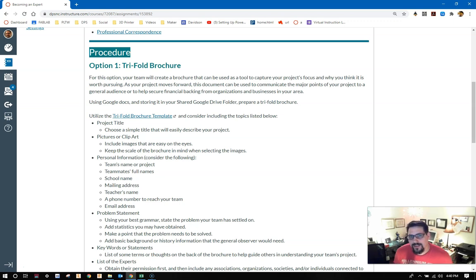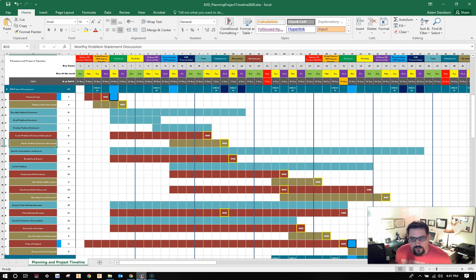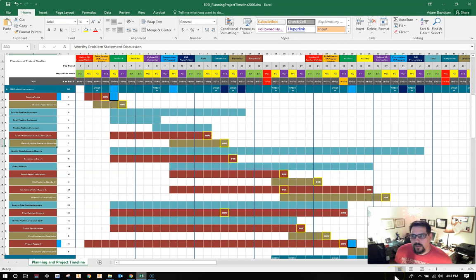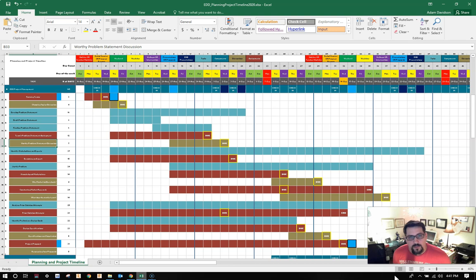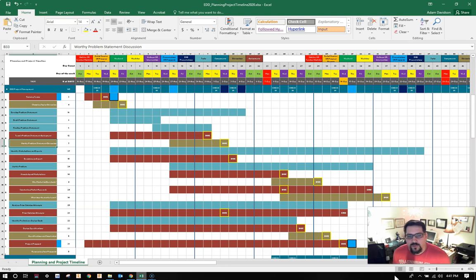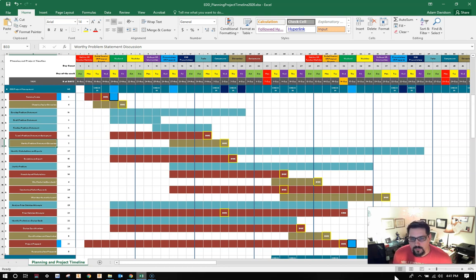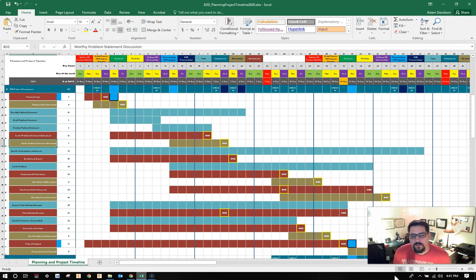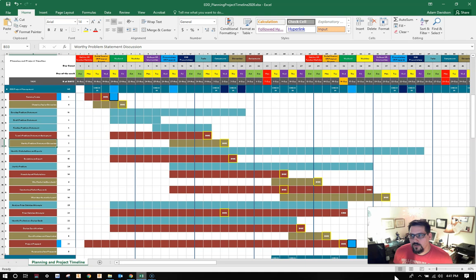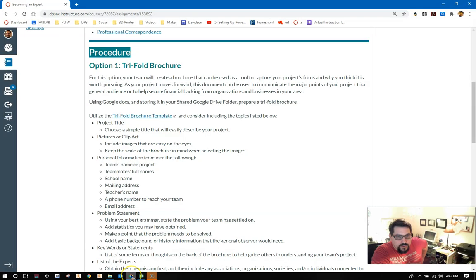This is why it's important that this is concurrently going with the team's problem statement assignment. If we look at the Gantt chart, you can see that you have only a couple of days after the team's problem statement assignment is due to then get this trifold, or if you choose option two, the website finished and ready to be turned in. At the same time, you're also going to be finishing up prior solution attempts. So a lot going on. You have eight days that you should be working on drafting the problem statement. You might want to give this assignment to a person or two within your team and split up the workload a little bit if your team is big enough to do so.